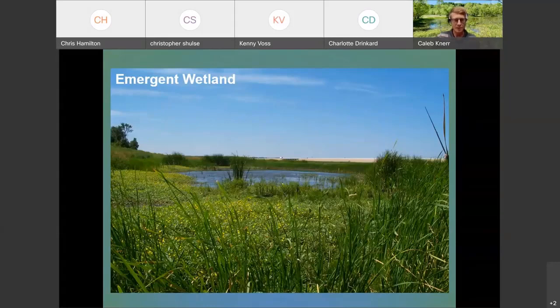Essentially, if this wetland was adjacent to a stream that in a typical year would overflow its banks and fill this wetland area and then recede, the jurisdiction would stop at the end of this wetland and not just the banks and ordinary high water mark of that stream. So the connectedness of the wetland feature to the stream is what defines the extent of the jurisdiction for Clean Water Act permitting for MoDOT projects.